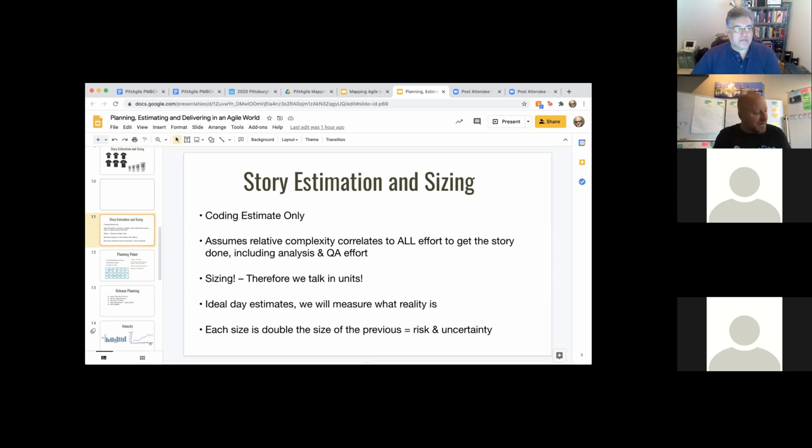And we'll sometimes write down on the back of the card what the acceptance criteria is. So, when we had that conversation, we write on the back of the card, okay, it has to happen within half a second, and the field needs to be masked. So we'll write some of the acceptance criteria we talked about when we came up with how big or small that problem was. Okay.